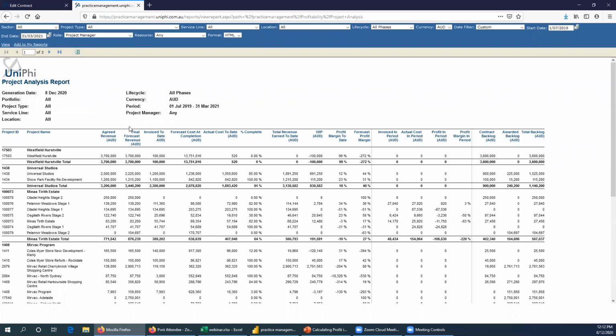and if I went into the other contract, it'd show the differences there as well. So the final forecast revenue is a whole of project contracted fee, plus any other elements that you may put into the system through the forecast to complete function in the revenue module. So any pending variations, any possible variations, any changed contract amounts will appear here as a sum up total.